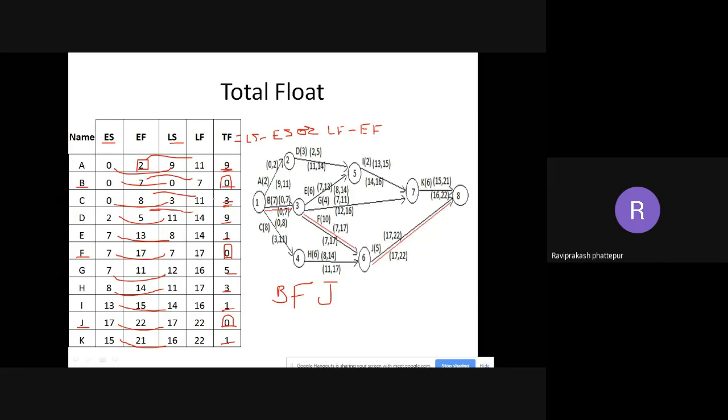But for the critical path, if you see 0, there is no extra time given to you for the activities in the critical path. That is what this means basically. Some more time is there for other activities than the critical path. That's why the maximum duration in which your project will finish is the duration that the critical path takes. Any doubts here? Understood what total float is?